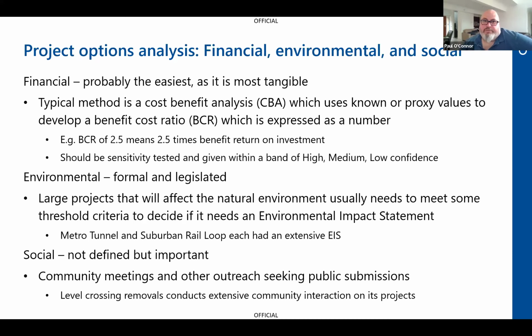There's actually two more ways. One is what's known as a Monte Carlo analysis, which is a randomized stochastic analysis, which is basically to generate a bunch of random outcomes and then plot them in some sort of bell curve so you can work out what your likelihood distribution is. Once again, it's entirely theoretical. It's just playing with numbers, but it does help you understand that in a potential 100 random situations, where would your likelihood fall?